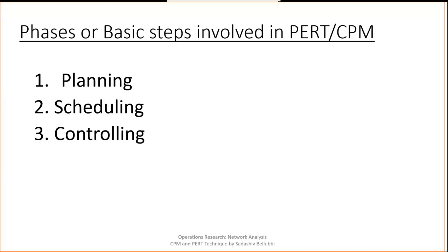In this planning phase, we can divide the huge project into smaller projects. Again, smaller projects can be divided into activities. For each activity, we can write the cost and the time required for completion of those activities.